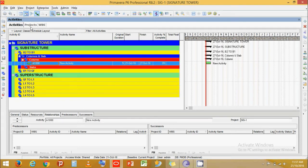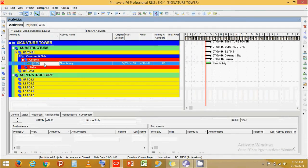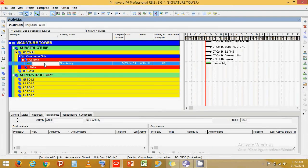That is because the project is set to an activity prefix A, activity ID suffix of 1000, and an increment of 10. Now let's give our own ID. Let's call it SIG-B1-C1-100, which stands for: SIG = Signature, B1 = B1 level, C1 = Column, and 100 is the numbering. Let's call this activity Column Rebar.